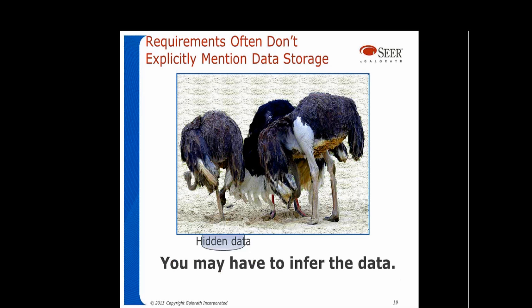Usually function counts grow over time as an application is more evolved for a few reasons. One is obviously functionality invariably grows. You need to do more, and so the early function count is not necessarily complete. Also, the data is refined more. And that's reflected in function point, what we call expansion factors. You can learn how to grow a functional size over time. That's something that CRSIM has built into it. You can specify a functional size count done at the proposal stage, and we'll automatically add a sizing adjustment for the early stage of that function point count.